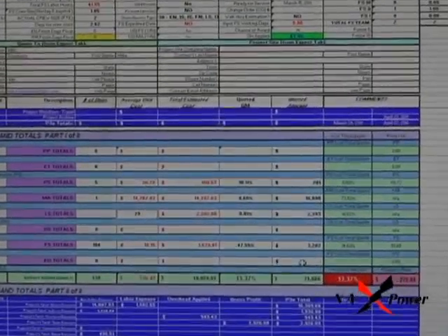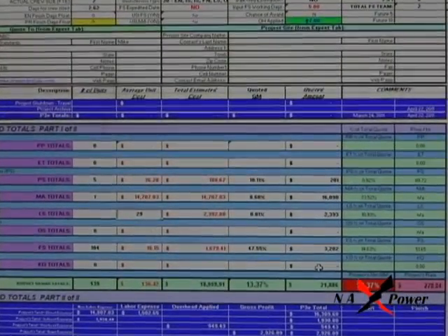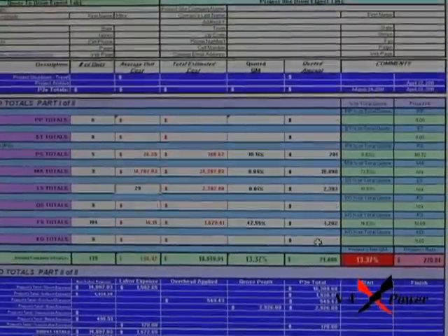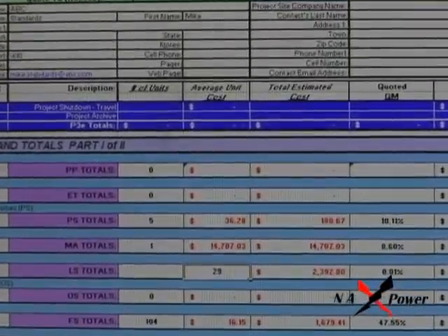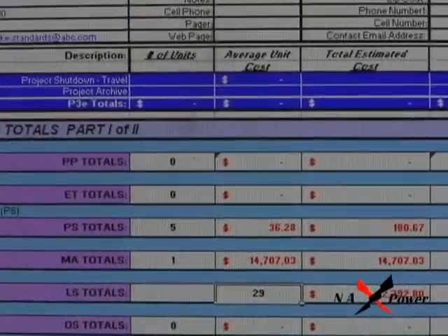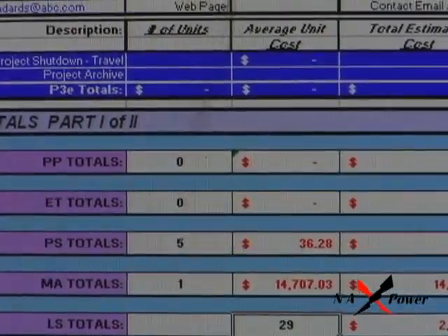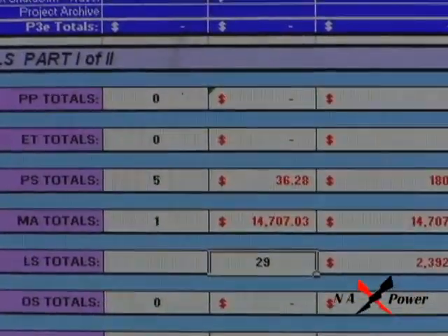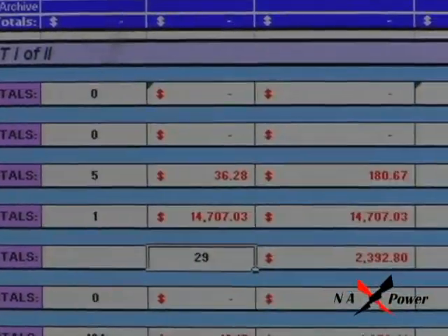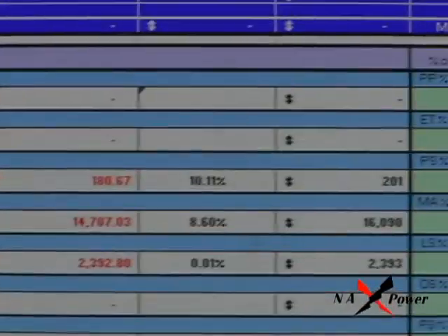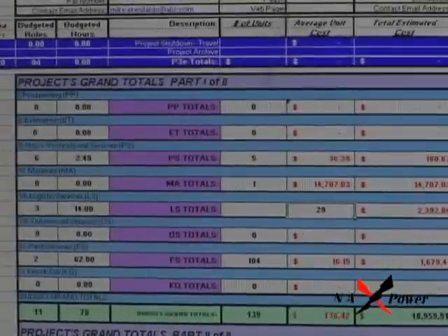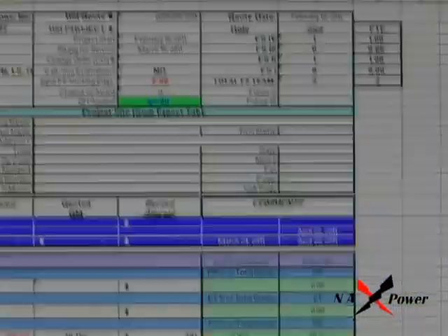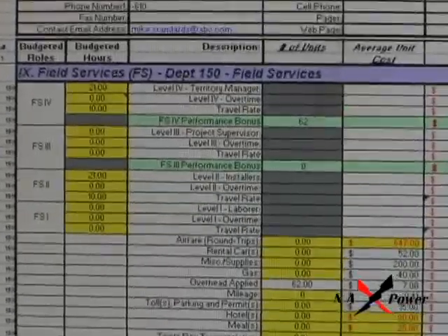And then if you have a project management system like Primavera or one of those types of systems, I know the more advanced Microsoft Project allows you to do some different things. You can now baseline your budgets, so you don't need people to go around and establish initial baseline budgets. You now can dump this once the quote is established and everyone buys off on it. And you always have a sign-off process to make sure that everybody, in particular the people that are owners of the company, buy into the budget and make sure that they want to take the risk for the project. Anyway, that's the Budget Model Workbook, also known as the BMW. Thanks.